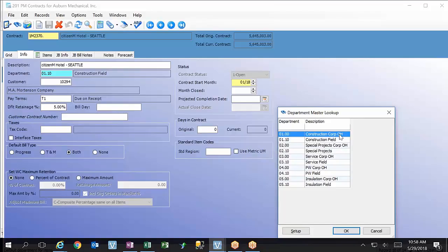And what that means is a potential project, usually a large project that we have to do a lot of work for to try to get. And we have a certain percentage that we're going to get that job. We would spin up a potential project to actually transfer to an 01.10 project. Oh, so you actually just track the cost there until it's awarded. There you go.